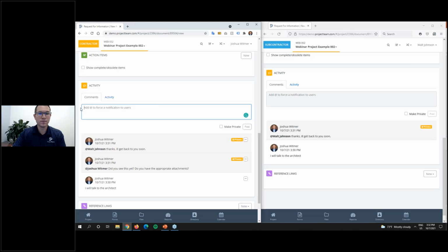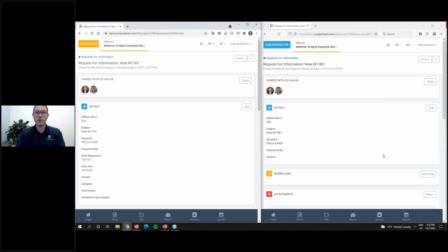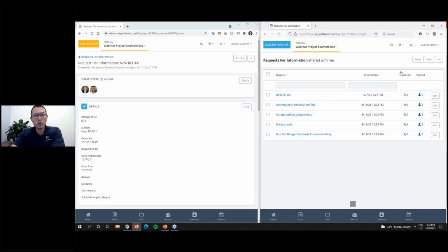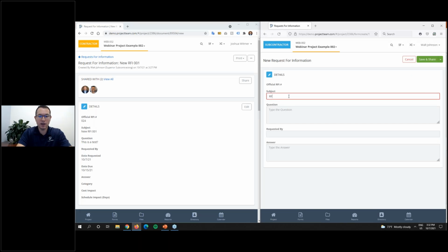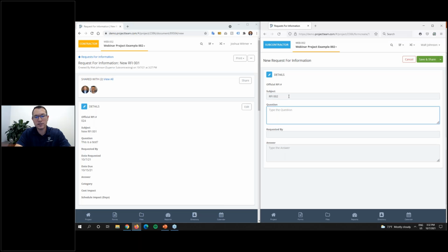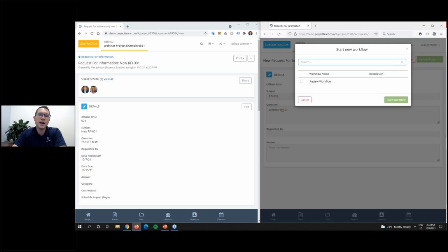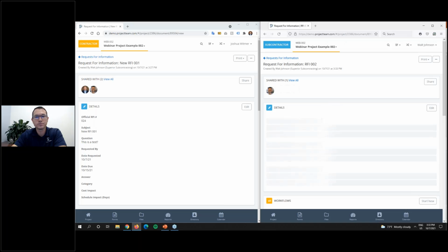Okay, cool. Let me go up to the top here a little bit. The other thing that I want to do here is, let's say that I go back to my RFI log as Walt. I create a brand new RFI. I can say RFI 002, and I'll say this is a webinar RFI 2 question mark. Instead of simply sharing that, I could click the little drop down here and workflow this RFI. This might be a common practice that you have subcontractors or contractors do. As they're creating information, I immediately want them to workflow everything that they do over to a certain process. I set up this review workflow, and I'll start that.